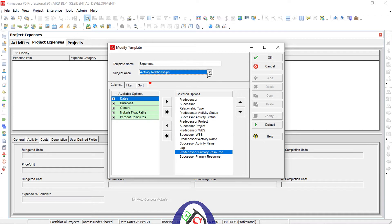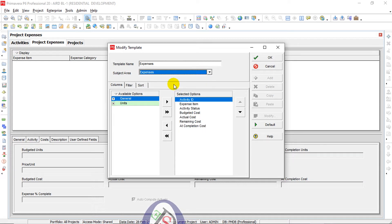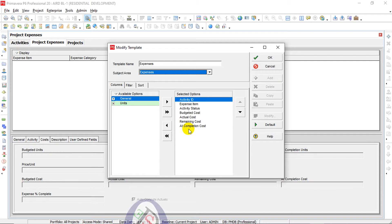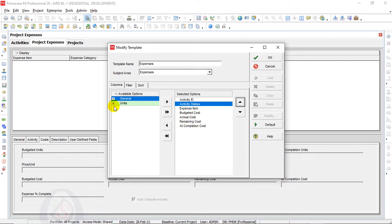The second area is Activity Relationships — leave this unchanged as it is tied to activities. For the third area, Expenses, the important fields are: Activity ID, Activity Status, Expense Item Name, Budgeted Cost, Actual Cost, Remaining Cost, and At Completion Cost.